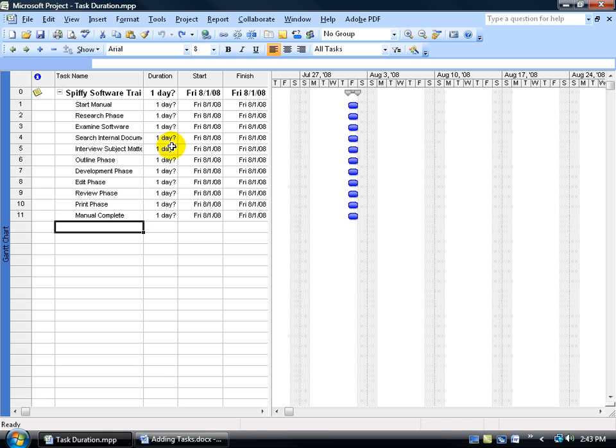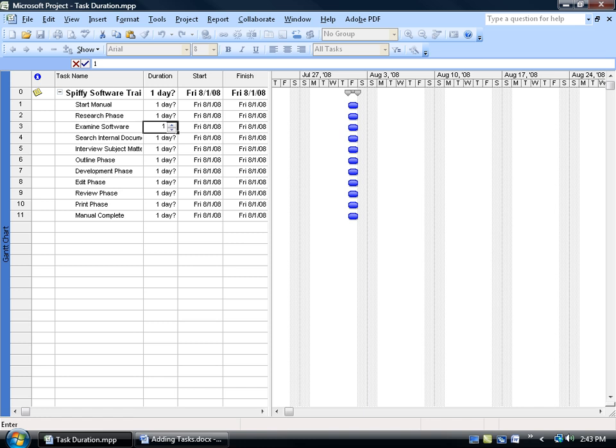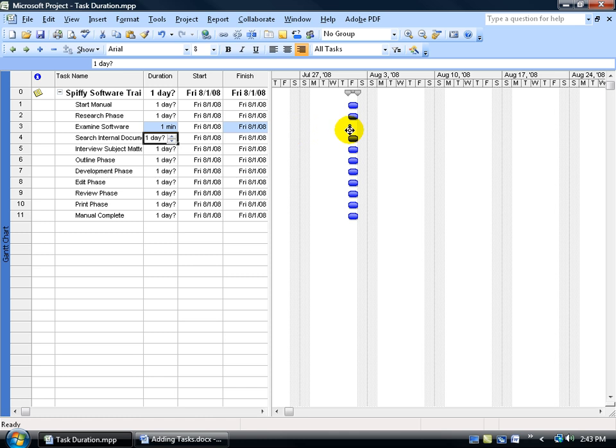When it comes to entering in your hours, minutes, days, or weeks, just click in a cell next to a task that you want to change its duration. For your minutes, type in any number, and then the letter M after it, and hit enter, and you can see it updates to one minute. Then you can look over in the Gantt chart, and you can see you've got a smaller bar there because it's not covering the day, it's just covering a minute.